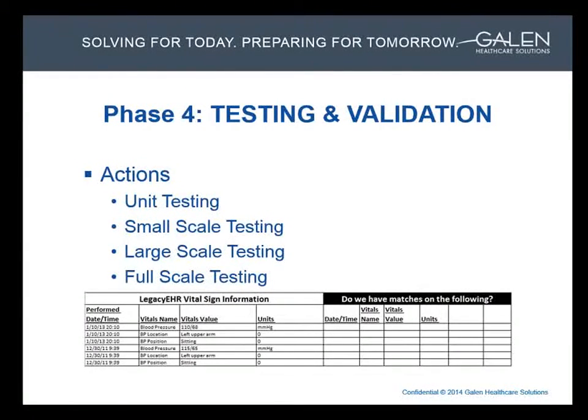The last phase of testing is full-scale testing. Depending on the target system and the client preference, full-scale testing may or may not be required for the conversion. During a full-scale test, all the patients and clinical data are converted to the test environment. It's kind of like a dress rehearsal for go-live.